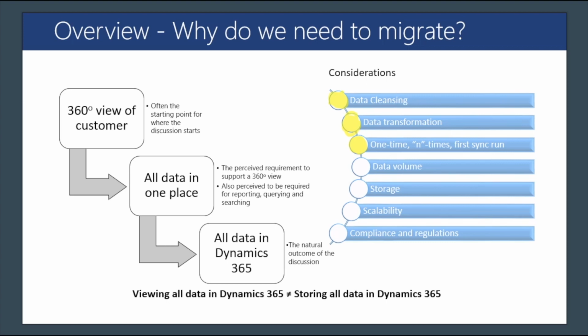But perhaps you can't really do that because data sets are so large that you can't accomplish it over a weekend, or you actually don't want to, and you prefer to move old data first, let's say until December last year, which historically is data that is not going to be touched any longer. You move that first, and then on that migration weekend, you're going to do what we usually call the deltas. So it's only the differential between that data until December 31st and the data that users have been working with until the day of the migration.